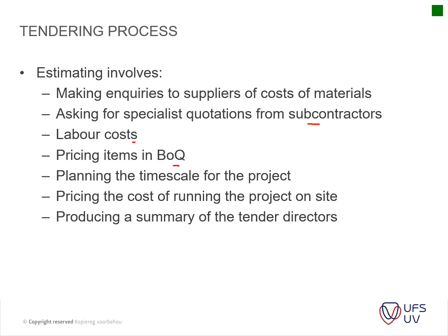Planning the timescale for the project. This is mainly for the P's and G's to be able to price that. So for instance, if you've got a crane on site, how long will that crane be on site? The cranes are usually charged per day, and the establishment cost, and then the cost per day is usually calculated on top of that. So you need to get a realistic time scale on calculating your P's and G's. How long will your insurances be running on the project? How long will you have containers on site, etc.